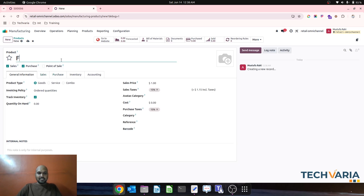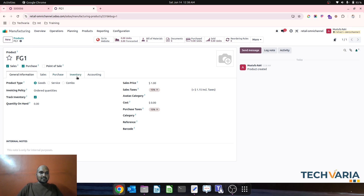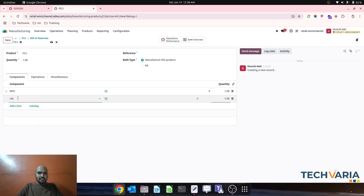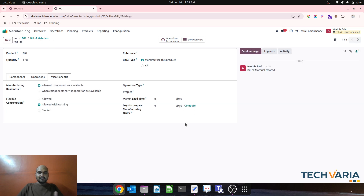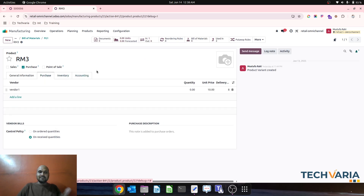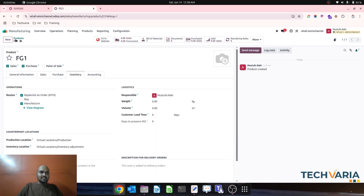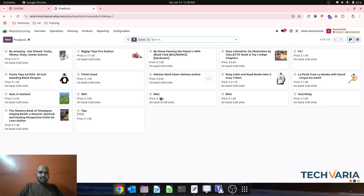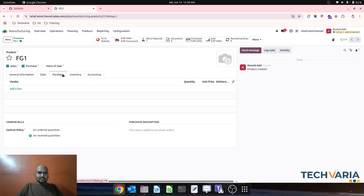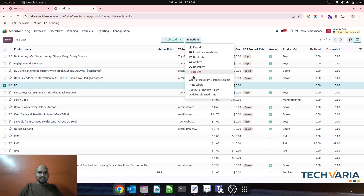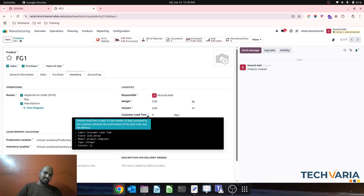Let's create a new product — FG1 as my finished good, manufactured on order only. In the bill of material I use RM2 and RM3. When I compute it takes nine days — based on RM3's procurement of eight days plus one day of security. Now on FG1 in the list view I select it, run the 'Update Lead Time' action, then go back and it updates my customer lead time automatically.